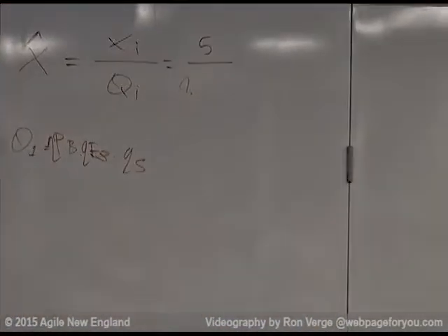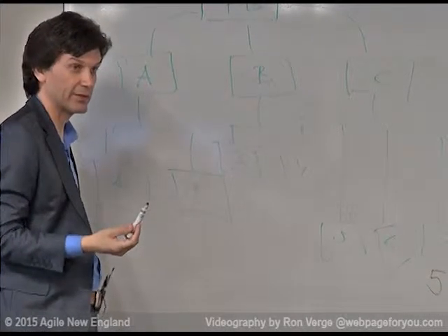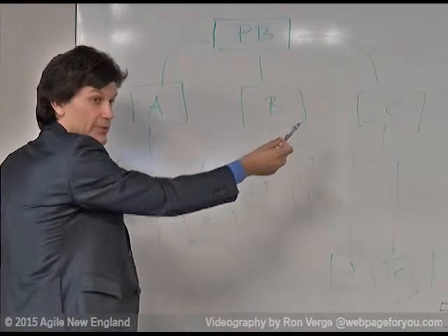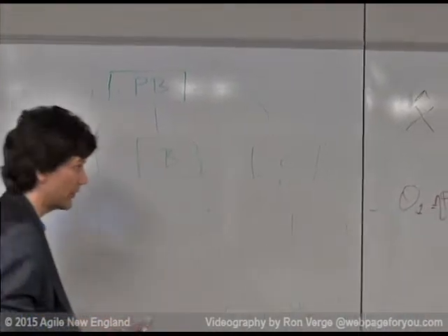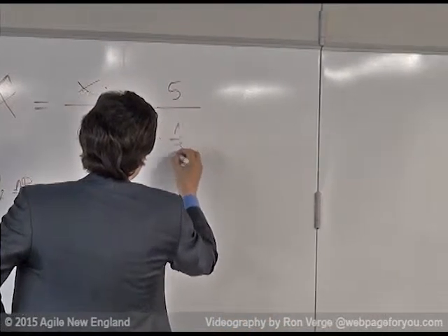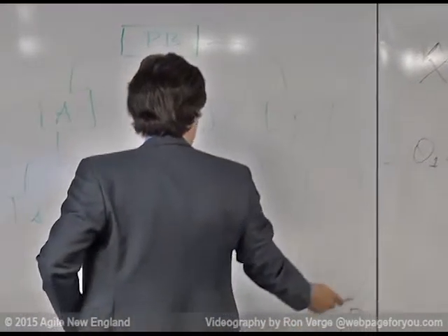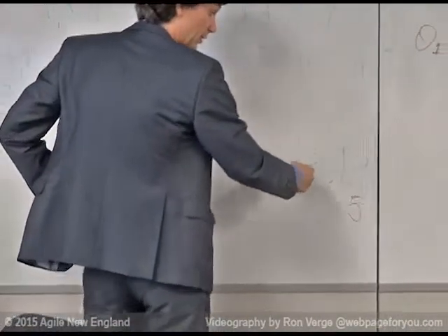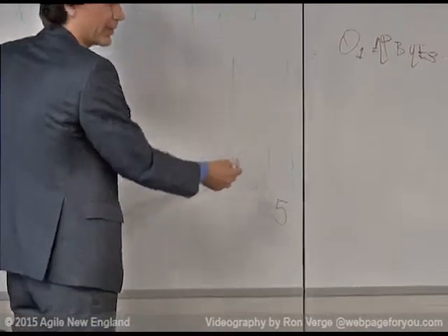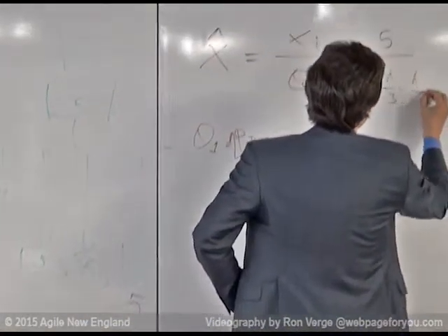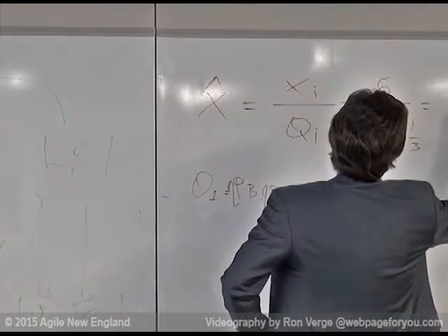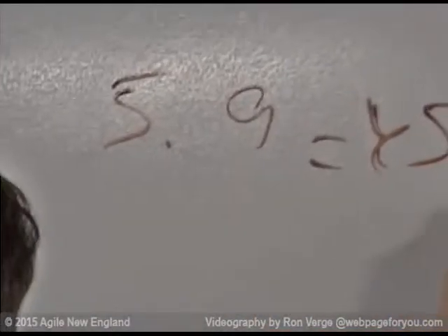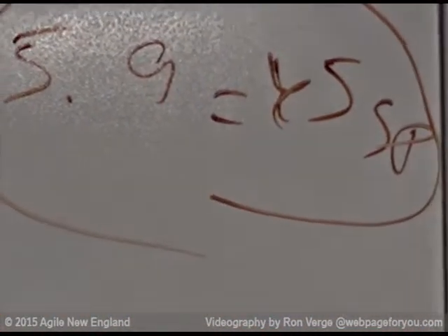We have 3 epics, so if we assume a uniform distribution, with equal selection probability, it will be 1/3. And the selection probability of this particular user story within the epic, if we assume again equal probability, will be again 1/3. That gives 45 story points. That's one estimate.